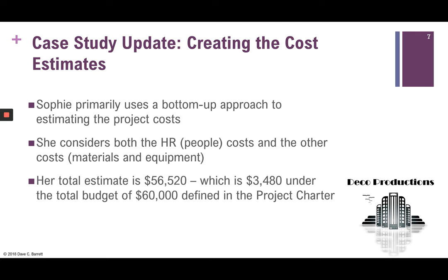The total estimate is $56,520, which is $3,480 under the total budget of $60,000 defined in the project charter. This is a good news scenario — we are under the $60,000. If it had been over the $60,000 budget, that would require a discussion with the project sponsor. In this case, we are just under $3,500 under budget in terms of our plans.